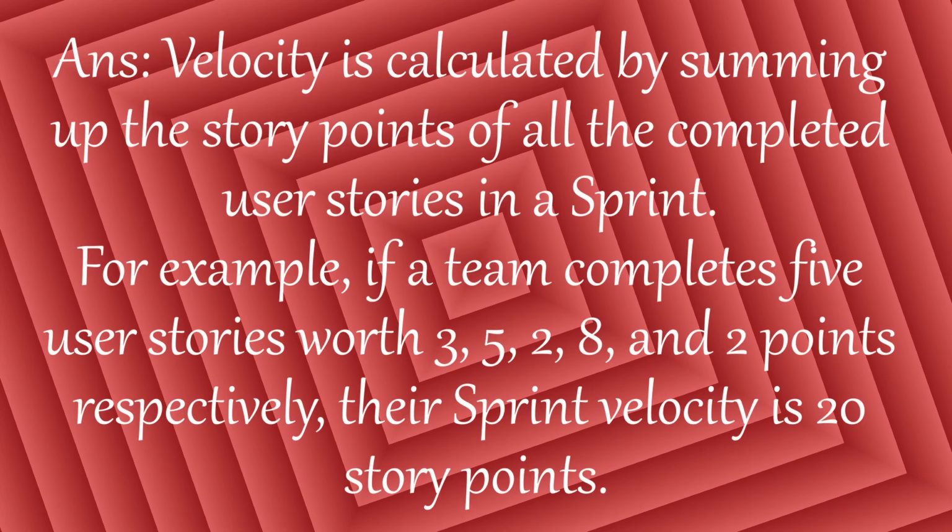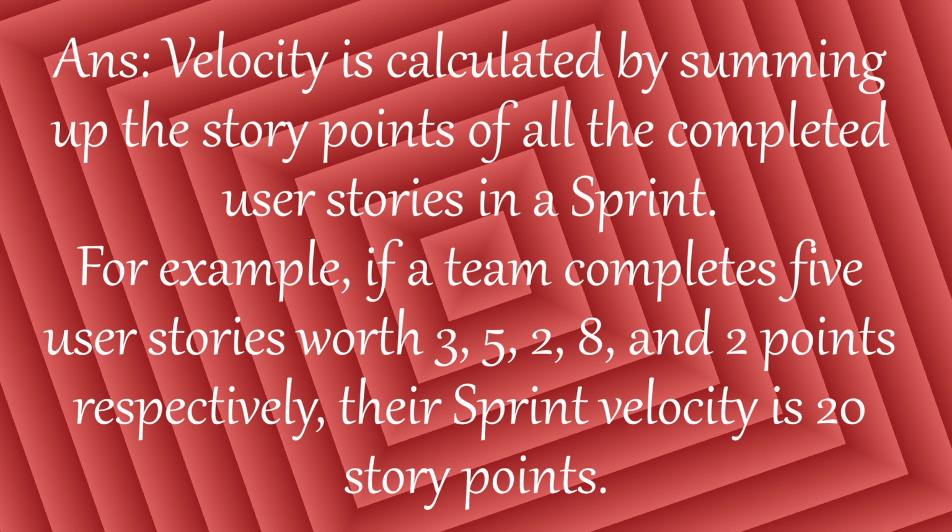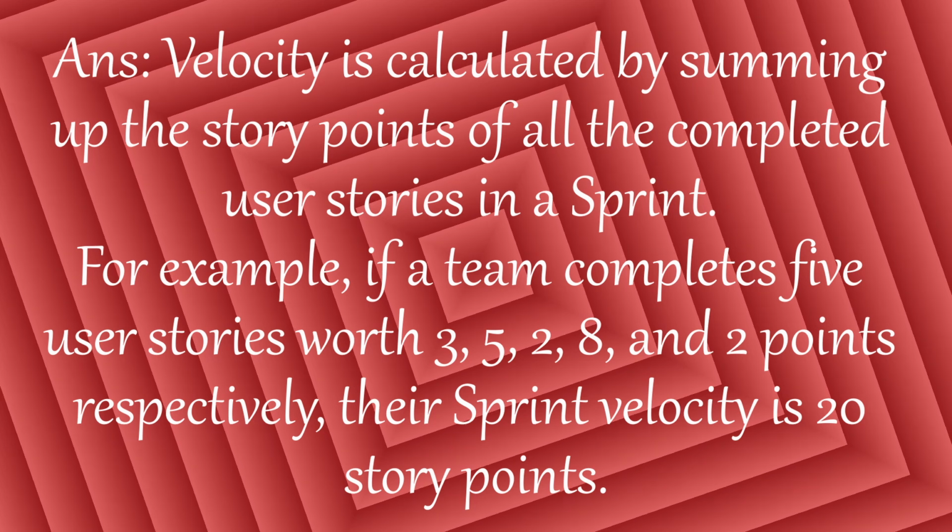Q9. How is velocity calculated? Answer. Velocity is calculated by summing up the story points of all the completed user stories in a sprint. For example, if a team completes 5 user stories worth 3, 5, 2, 8, and 2 points respectively, their sprint velocity is 20 story points.